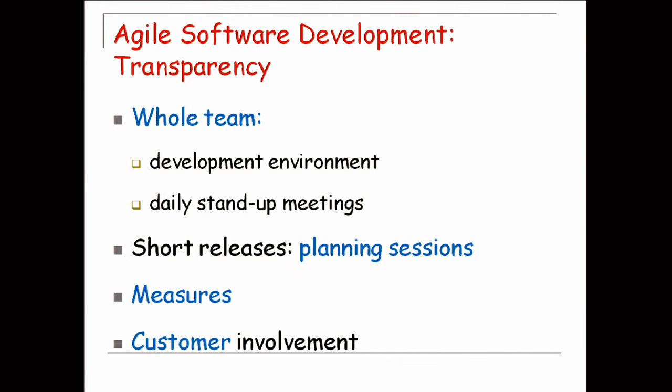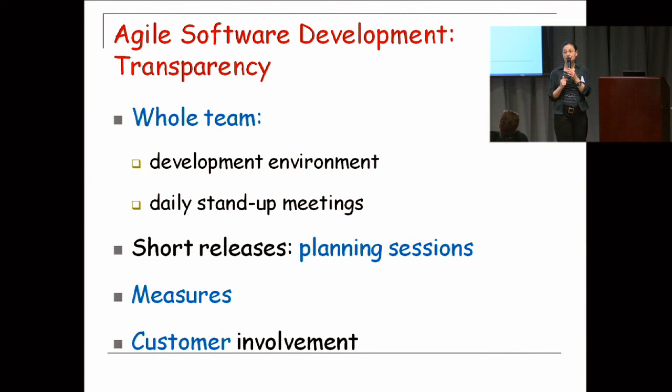The second one is daily stand-up meetings. Every day I, as a team member, report on what I did yesterday and what I'm going to do today, and I increase the process transparency. And if all the team does it every day, it increases the process transparency very clearly. You cannot hide anymore. You cannot compete anymore.